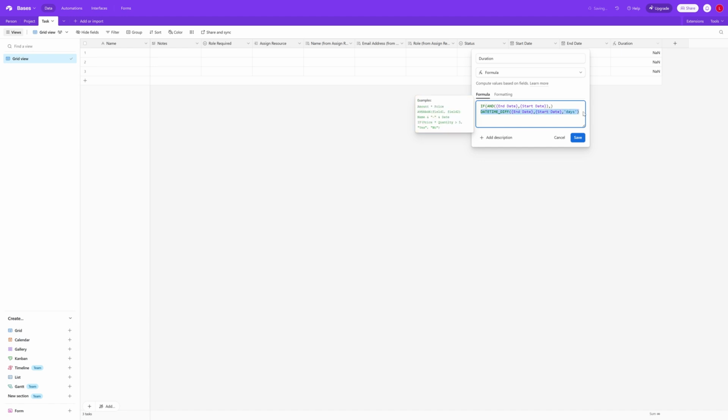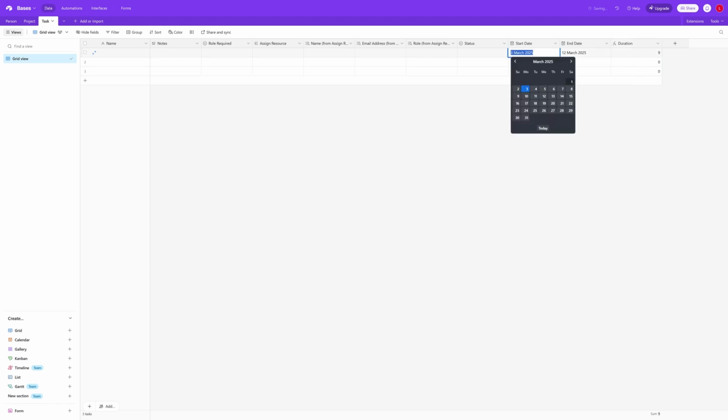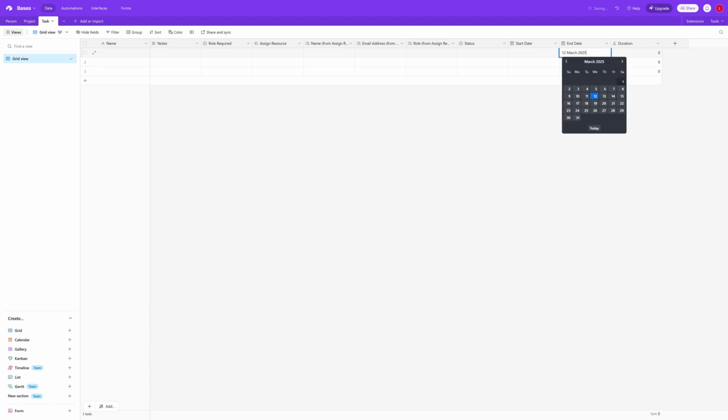So I'm literally just going to cut this out and drop that back in. And if they're not there, we want to return 0. So let's save this. And now we get our 0, 0. And then let's test this. 4th to the 10th, we get our 7 days for the week. And again, if we do a couple of days here, it's going to update that. So this now calculates our duration correctly based on the dates being provided.